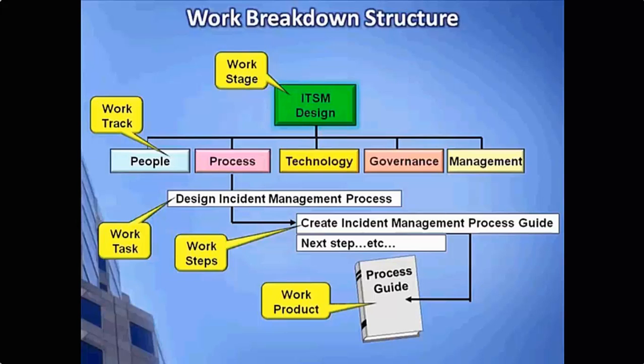So again, in the ITSM design stage, I need to design my organization, design my processes, design my tools and technology, and design my governance, decision-making, and reporting that I'm going to be using. And then I need to manage that effort as we go forward. So that's why those work tracks are there. Within each work track, I'll have work tasks, work steps, and work products. And that's just a simple hierarchy.